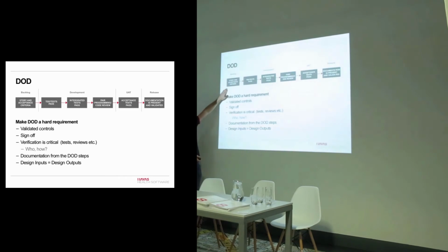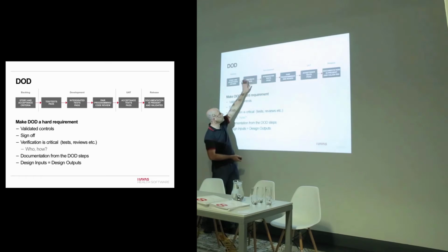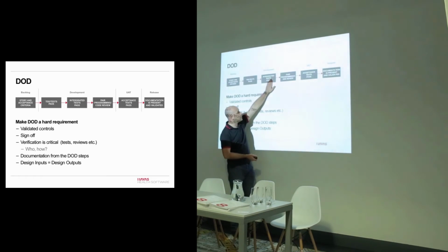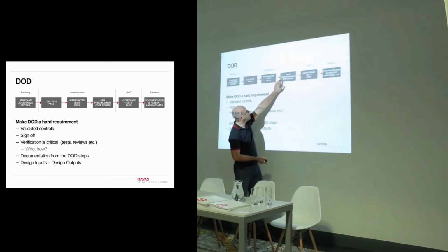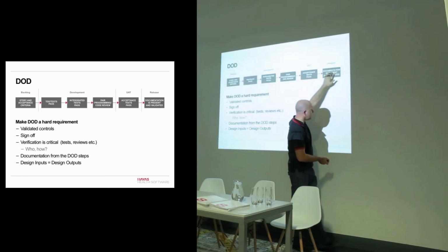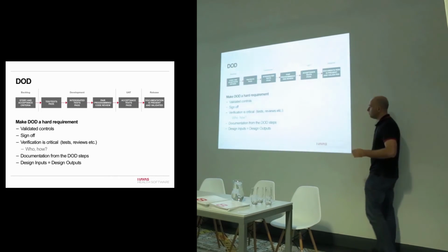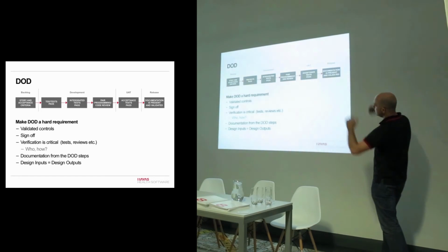In an Agile sense you have stories and acceptance criteria. Then it goes through its development process, so your unit tests pass, your integration tests pass. You may have a code review, you may have done some pair programming, then you have an acceptance test, and then you have your documentation. That's kind of how your process may work.